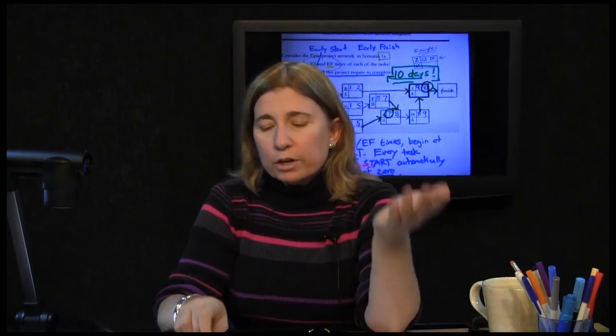Now, wait a minute. What if there had been more than one task attached to the finish line? Oh, that's not too much more complicated. Well, you'd have like 2 or 3 different early finish times then, right? What do you do? It's the same thing as the early start time, early finish time rule at the bottom. Just pick the largest, right? You would be waiting on all of them to conclude. Pick the largest. That would be the duration of your project.